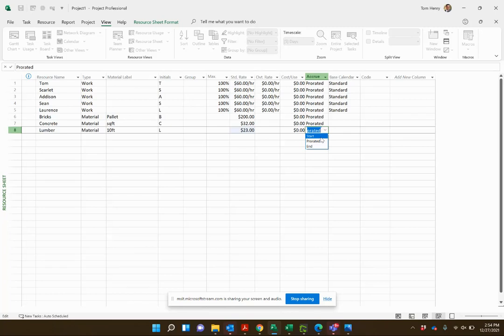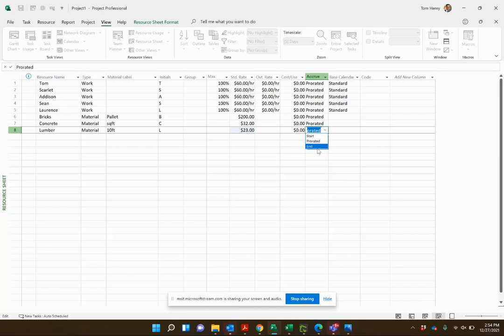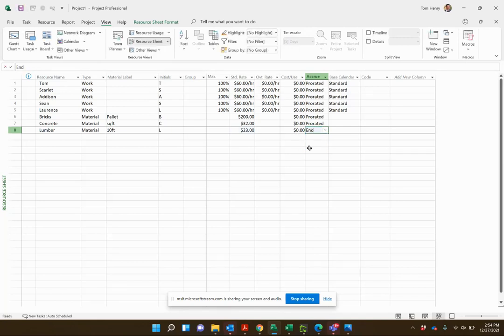Do you want to do it the moment you pay? Are you prepaying materials at start? Are you paying over time, quite unlikely, but if it's a long duration then yes you probably would be paying over time. Or do you want to just square up at the end? This lets you know when the costs in your projects are going to be realized.